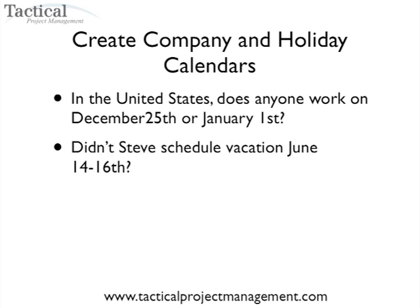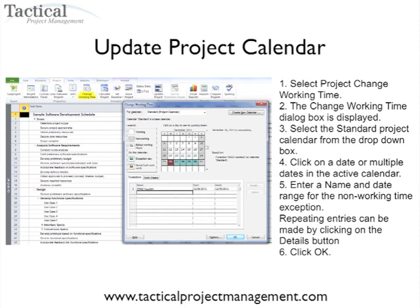Think about your team member Steve — didn't he schedule vacation on June 14th through the 16th? If Steve is scheduled for work in the project schedule, you're going to run into end date problems because he's out fishing. To update the project calendar, select Change Working Time from the Project Menu tab. The Change Working Time dialog box will be displayed, and if you select the standard calendar, you can click on a date range and enter the name and specific date range for the non-working time. In this case, I put in Christmas Vacation for the entire team from December 26th through December 30th, so Microsoft Project will advance the dates and realize that no one is scheduled to do work at that time.